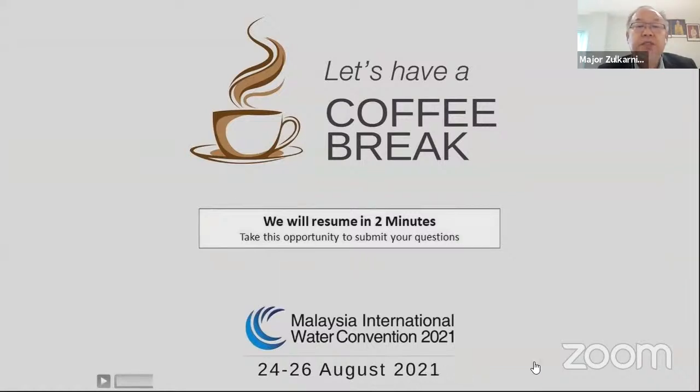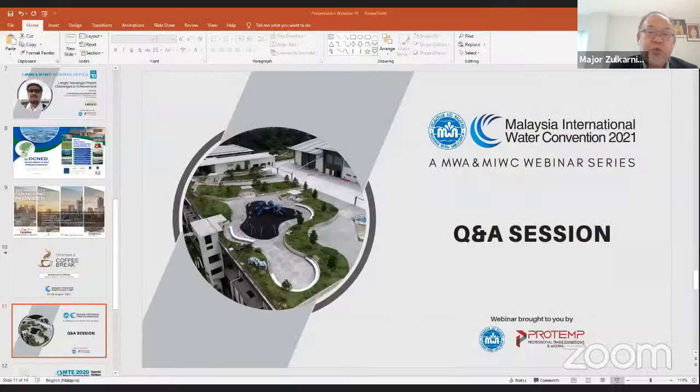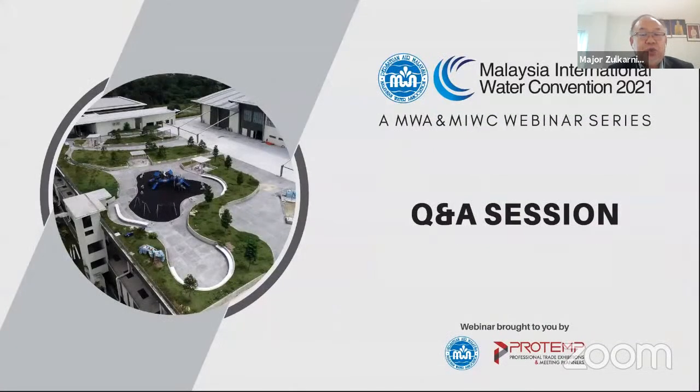Okay, is there any flooding issue that has troubled your site situation? If yes, how do you handle it? Actually, we don't have any flooding issues due to our works. What we have is the shaft. Let's say there is rain overnight, so when we start work the next morning, we have to pump out the water. And the flooding issues due to our work is, I will say, almost nil.